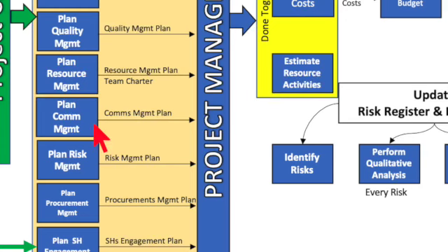Your communication management plan is your document for how you plan to send and receive information between stakeholders. For example, the military has a framework for communication management. It's called the PACE plan: primary, alternate, contingency, and emergency. Your primary method of communication might be a weekly meeting, or the daily stand-up, or an email chain. Either way, as long as the team knows what the communication management plan is, they can then expect how they're going to receive their information.